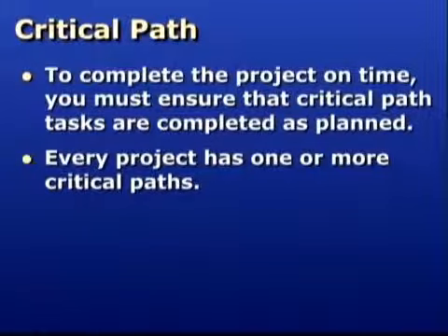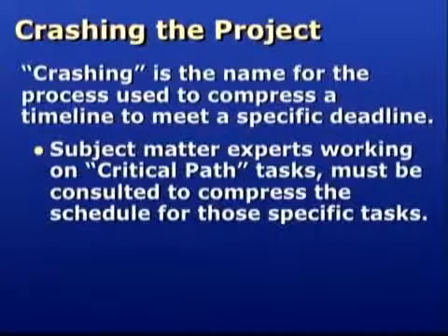Identifying the critical path for a project allows a manager to focus additional attention on those tasks to ensure an on-time delivery of the project. It's not unusual for unforeseen circumstances to alter the original project schedule. When this occurs, it may be necessary to compress a segment of the original timeline that affects certain tasks of the project. This is referred to as crashing the project timeline.